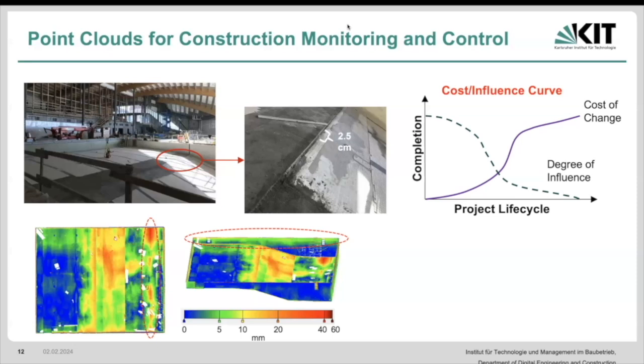Regularly, exactly. So the frequency of data collection becomes very important, right? That means that the more frequent we collect the data, the better chance we have of detecting what these problems could be early on or at the time that is going to be taken. For instance, if we do it every 4 weeks and a deviation is occurred at week 1, what is going to happen? We've identified this 3 weeks later, whereas if we were doing it every week or twice every week, we would be able to identify it much better with much more accuracy and much more frequency. So here the frequency becomes very, very important for the timely identification of these deviations.